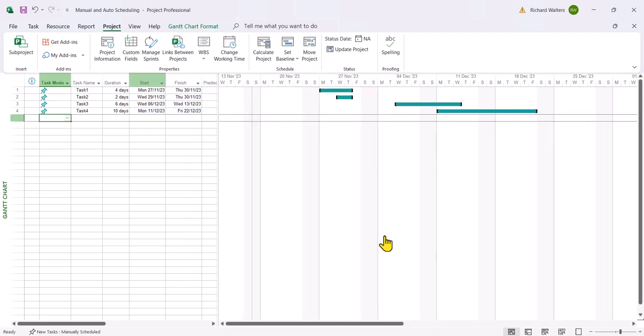So the start date in effect is still on the 27th of November and the next date is the 29th of November and nothing's changed in line with the date that I've selected which is what I'd want them all to change to. Now this is because we use manual scheduling and we've actually done things ourselves and this can be quite a limitation within project. It can be used at times but like we're seeing now it doesn't link to some of the nice automated features in project like project start date.